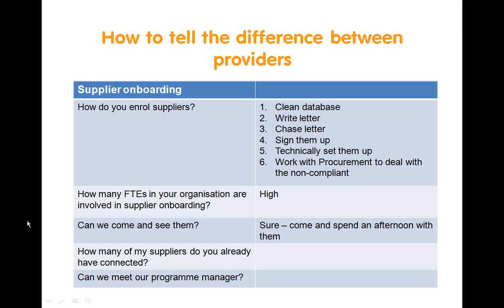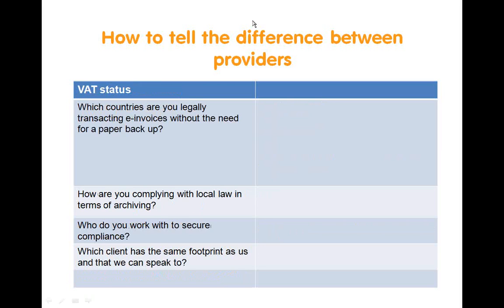Can we meet the program manager? Again, program managers are key. E-invoicing is a project that touches your suppliers, but also touches the internal mechanics of your organization, especially across procurement. You need a particular type of person to make this work. So when you go to your service provider, meet with the program managers and select one and tie them into the contract, because you need somebody who's going to really make this work and who won't take no for an answer and will push things through and is really quite resilient. So knowing your program manager before you sign a contract is absolutely key.